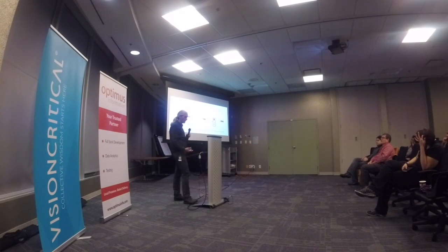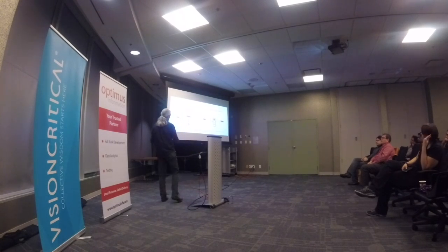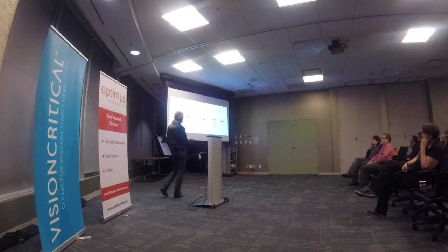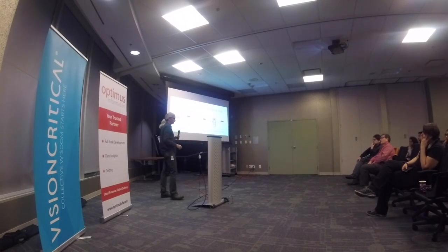I've got a duplicate slide here, but what you're going to do once you've done that sort of thing is dig deeper into each of those risk areas. And I've kind of just done that for you. Let's just pick one. Say it's the client browser web UI, which you're probably most familiar with. If we pick that and say, okay, that's the highest risk area, the highest probability of something going wrong, and the biggest impact if it does go wrong, as I explained, no one can respond if it's not working. Pick that, and you're going to dig deeper into that.